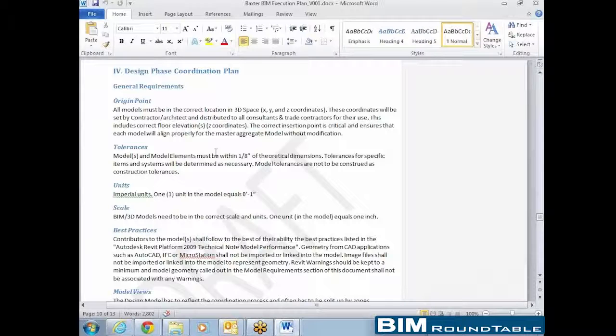Have you talked about how you're handling licensing for that? Are you going to license it per project for the entire team, or are you just going to assume the different project participants handle their own licensing? Well, what we've done before with Navisworks is we have the license, we handle it, and then it's charged to the engineers. Okay. I've been at $200 per user per month of the project. And that's something they can turn around right into the contract.